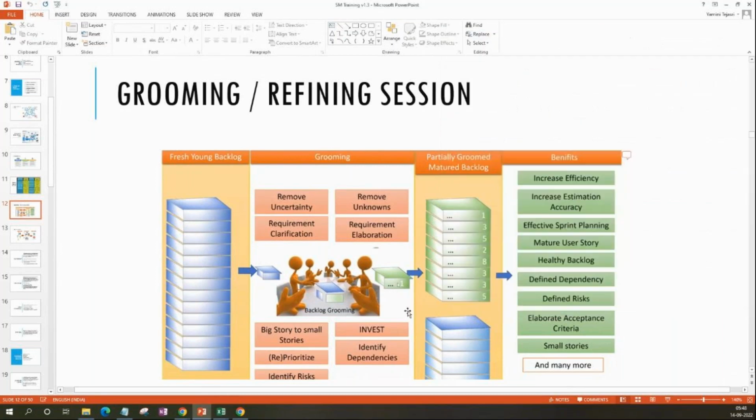Fine. So this is all what happens in the grooming session. The team discusses the user story, and once the team understands everything, the team will say, hey, it takes one day, one story point. It's called a story point. Why story point? I'll tell you later. For now, consider 1 = 1 day, 3 = 3 days, 5 days, 2 days, 8 days. Assume. Now, after understanding everything, the team will say, hey, it requires 1 day.